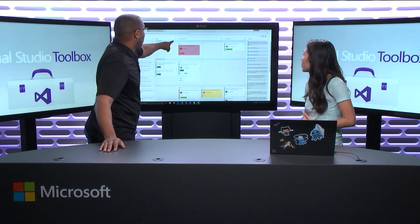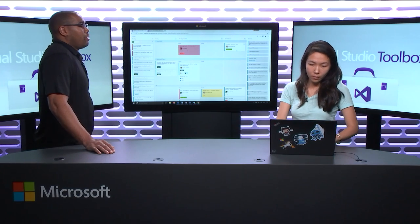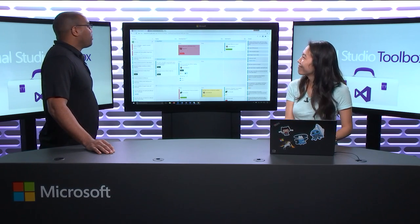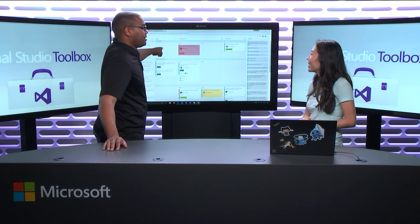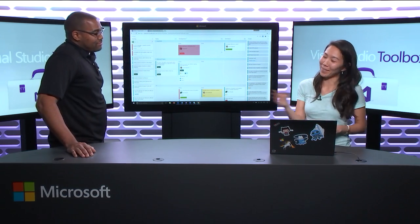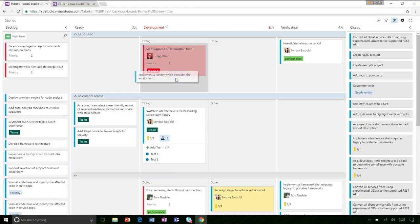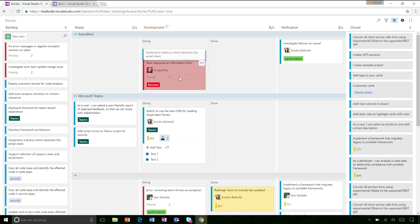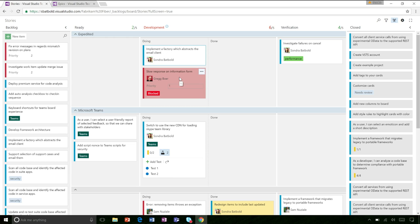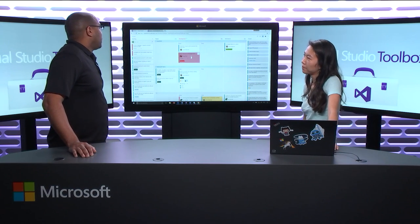I see the fractions up here — those are the actual WIP limits for these particular columns. Are those soft or hard? What I mean is, if I'm over my WIP limit and I try to drag something, can it bounce back? We won't bounce you back, but we will give you a nice little red indicator. Let's say I drop it into development and I've gone over my WIP limit — not only does the column title turn red, but you'll also see that you're at six out of five and you've been flagged.